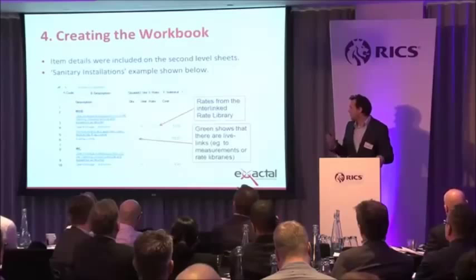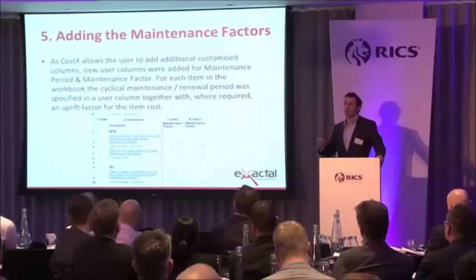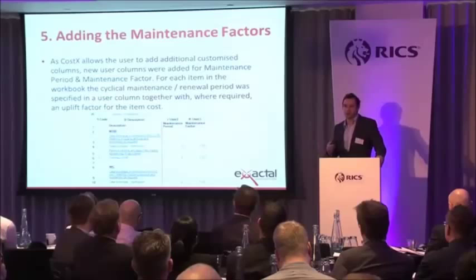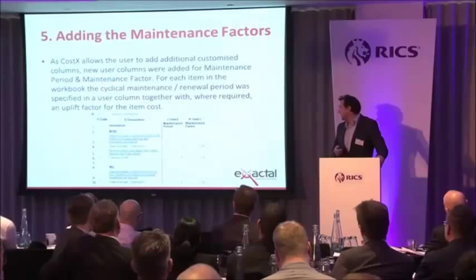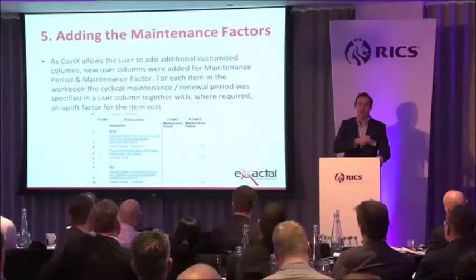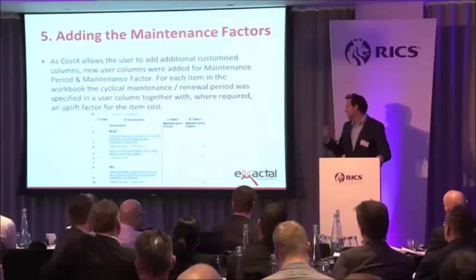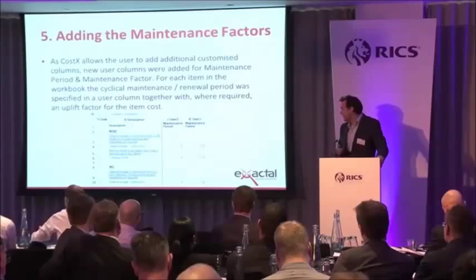The next columns — what Costex gives you the ability to do is add user-defined columns to the workbook, just like you do in Excel. So in this case we added a maintenance period and a maintenance factor. In the actual replacement items, we can leverage the replacement cycles from the BCIS documentation. But on the maintenance items we have to make some assumptions, and that's probably why there is a bit of a difference between what we had done and maybe another vendor. We also need to add in the data requirements for life cycle costing.